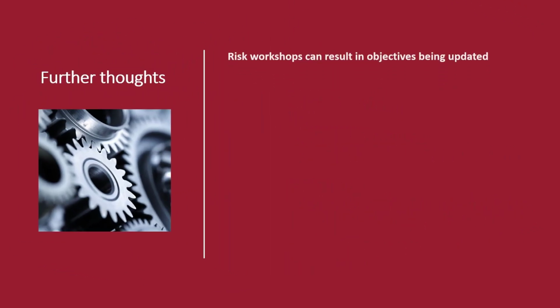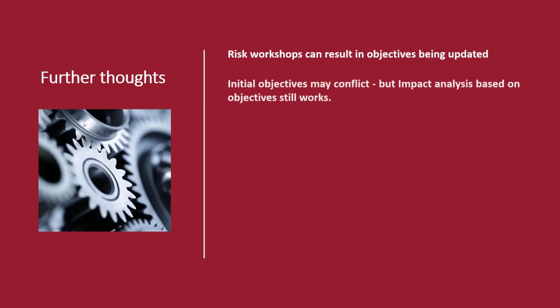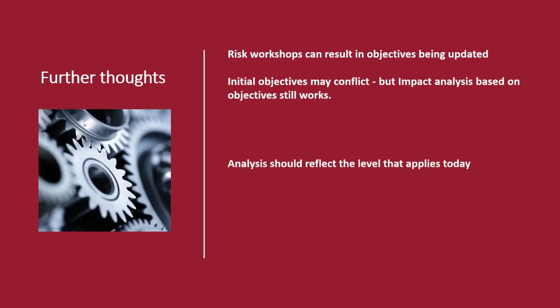Before ending this video, I would like to highlight a couple of other quick items that relate to objectives and analysis. A risk may be identified that doesn't affect an objective. When this happens, it is either not a risk to the project, or the objectives need to be updated. Objectives may not align, and may even be in conflict. Sustainability, zero carbon targets, and upper limit costs often clash. Similarly, a principal's objectives may be different to a contractor engaged to help with the project. Ideally, work needs to be undertaken to align objectives as much as possible, or at least prioritise them.